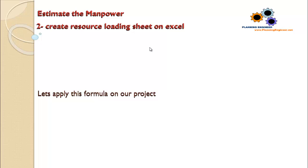But I think in 90% of the project you will have that the duration is fixed and you are going to calculate the manpower required to execute this duration.